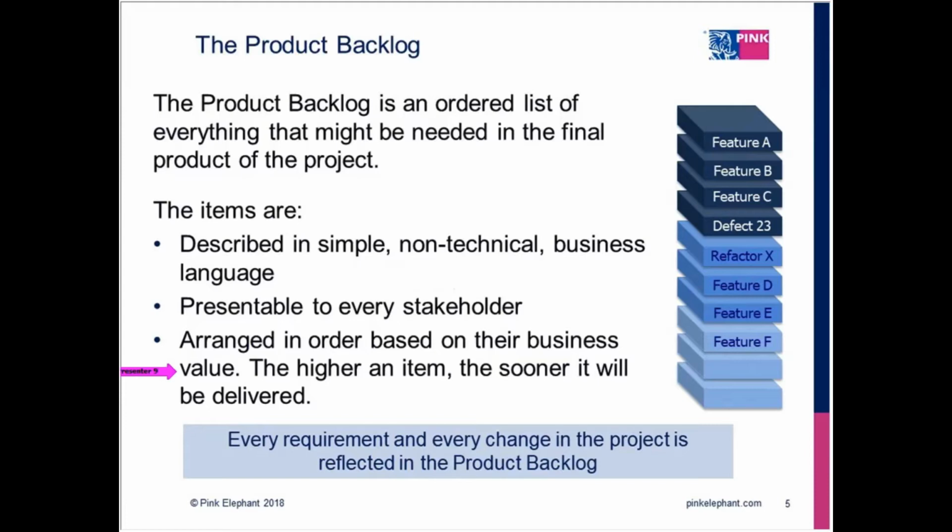Okay, so key about the product backlog, it's good to have database tools for this. You can do it with a spreadsheet, but spreadsheets lose their functionality when you get a bit more detail and depth and complexity. So anyway, every requirement is reflected in the product backlog. Everything you want to do but may never get to do is in the product backlog for the product. Or in an ITSM sense, this could also be a service product backlog.